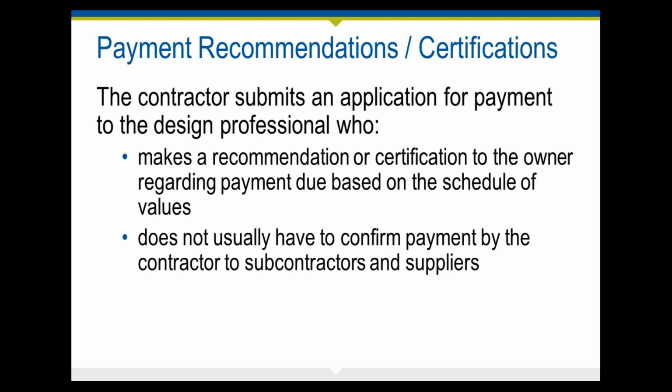Those are the types of things that you need to be aware of. You could be held liable for certifications to parties other than the client. So if you're providing certification statements to the lender, for example, and that turns out not to be true, even though you don't have a contractual relationship with the lender, they may still come after you. So be aware of certifying about payment or what is reasonable, what is available. That's really not part of your services.